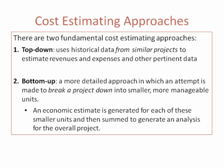The bottom-up approach does have those details. It's a way of estimating costs by looking at all of the components that go into the project, breaking them into subcomponents and finding their expenses. A top-down approach would be like a contractor giving you an eyeball estimate — your driveway looks about twice as big as one that cost $5,000, so $10,000. A bottom-up approach would have the contractor use a measuring wheel, get the driveway dimensions, and think about how much asphalt, subgrade, and excavation is needed. Bottom-up estimates are typically more accurate, though they take more effort to generate.